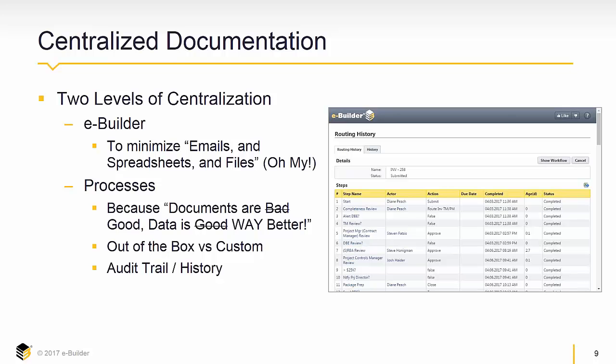We also moved from some of the out-of-the-box functionality to more of a custom functionality that the processes module offers. An example there is we started out using submittals, and for various reasons decided that we would prefer to have something we could tweak and modify as need be. So we built our own submittals process.